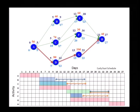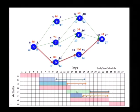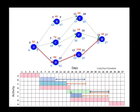Beyond a certain point, because B is connected to E, after B goes beyond 12, it starts affecting E. So one way, before it affects E — what is the float of B called? Free float. B has three days of free float, so it can move 1, 2, 3. If it moves the fourth day, then the early start of E starts getting affected. So B has eight days of total float and three days of free float.